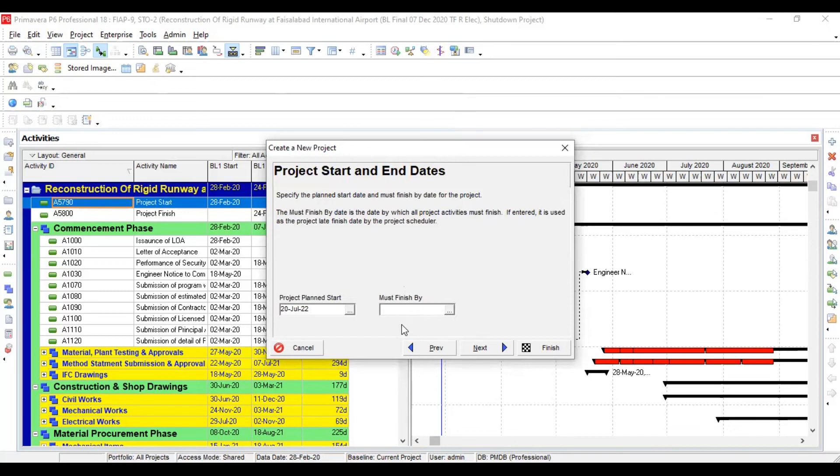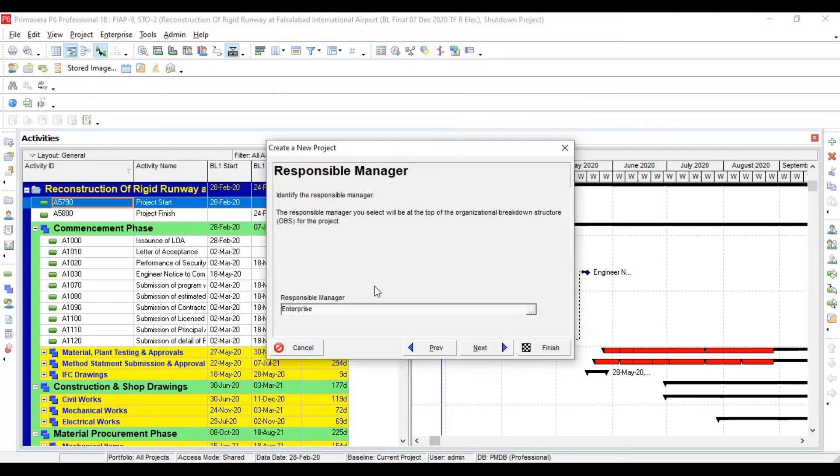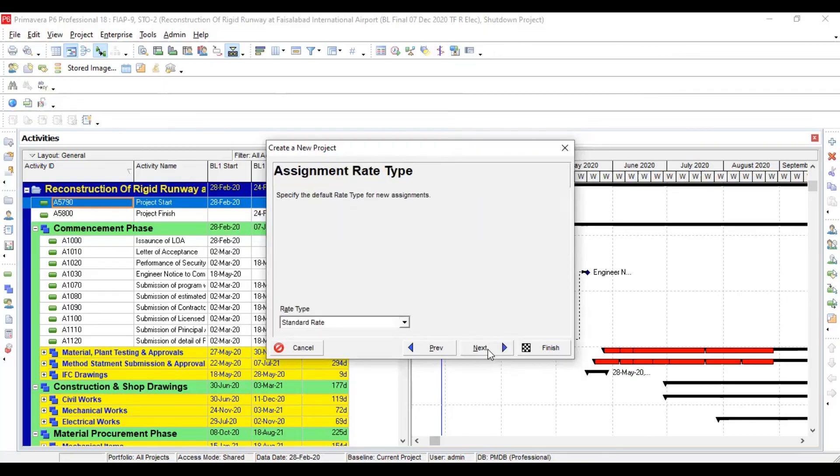So I'm going to assign July 20th, select okay. And whenever you are going to make your project file, never provide your project finish date at this stage because it will provide constraint to your project and there can be some misconception while calculation of your project float.